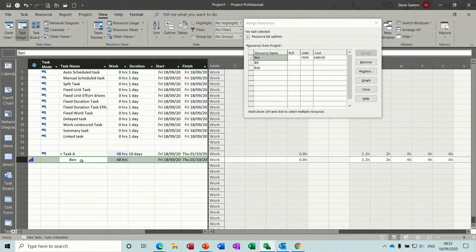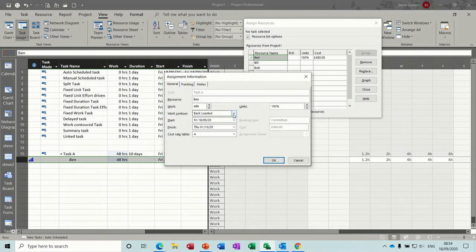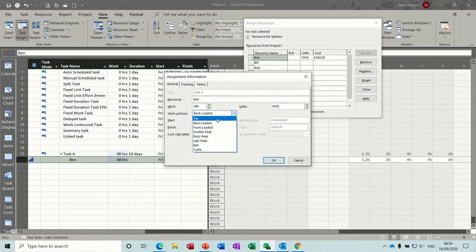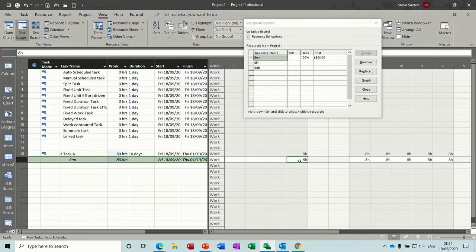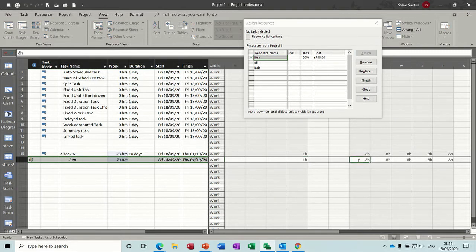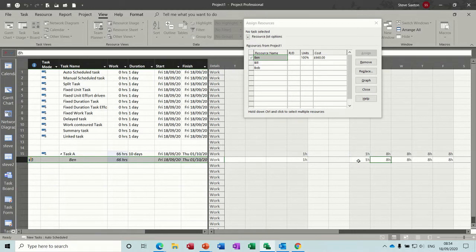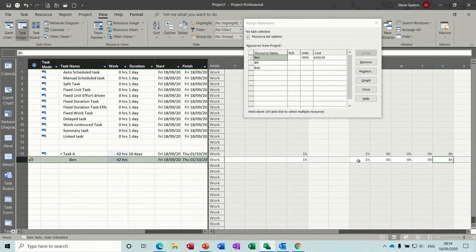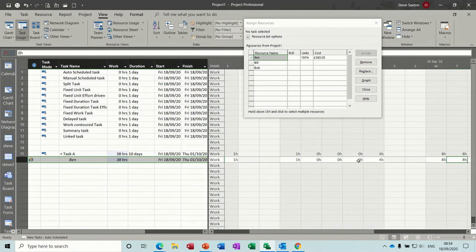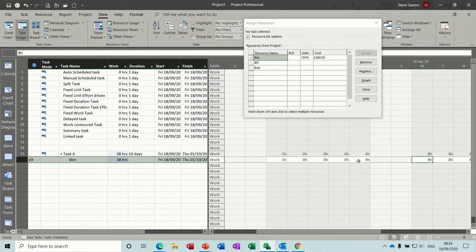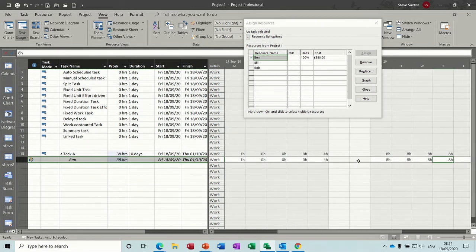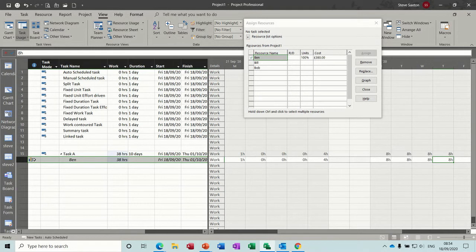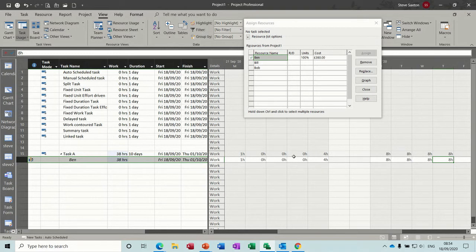Now you can also, if I go back in there, put it back to flat, OK. You can also manually do this, if you know, for example, you've got track record, you could go one hour, it's going to do one hour there, one hour. It's probably not going to work at all in those three days, then it's going to ramp up a little bit, like that. So that is basically you customize that, you've edited it, it's only going to be 38 hours. It's a more accurate way of planning your project, to be fair.